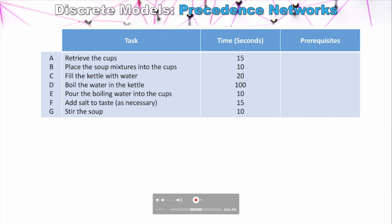The first step is to look at what the prerequisites are. Sometimes there aren't any prerequisites, but sometimes something needs to happen first — like you need to boil the water before you can pour boiling water into cups, otherwise you're just pouring cold water. Retrieving the cups doesn't require anything else, so it has no prerequisites. However, to place the soup mixtures into the cups, we need to retrieve the cups first — so we say we have to do A before we can do B.